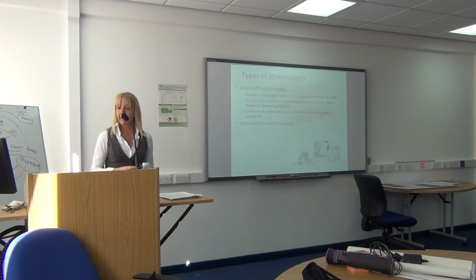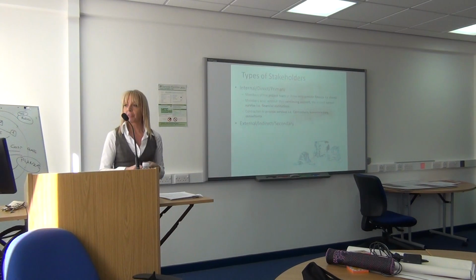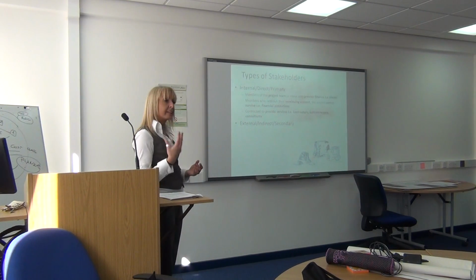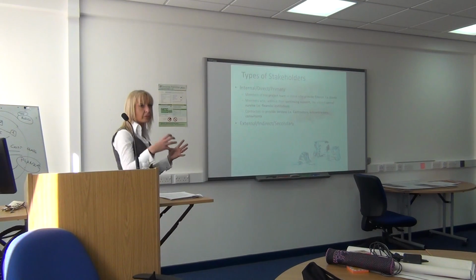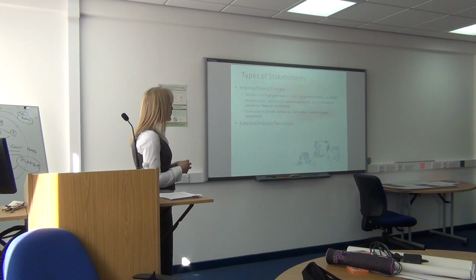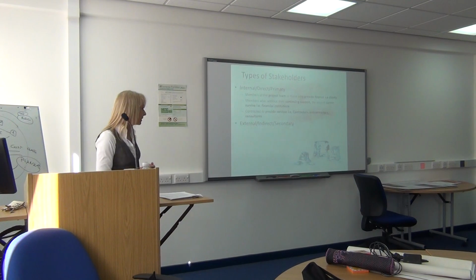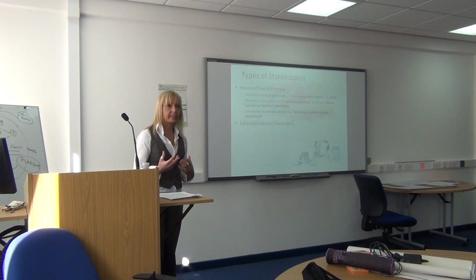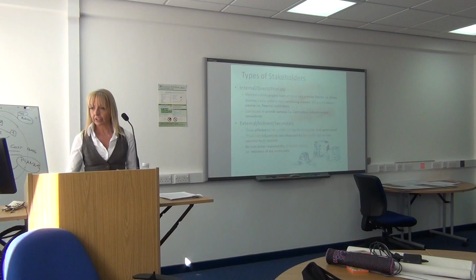So the internal direct primary stakeholders are the members of the project team, or those who provide finance, for example the clients, those who provide continuing support throughout the duration of the project for that particular strategy, from which the project cannot survive. So these are crucial people to the process. They're contracted to provide services, i.e. the contractors, subcontractors, suppliers, whoever is involved in this situation.